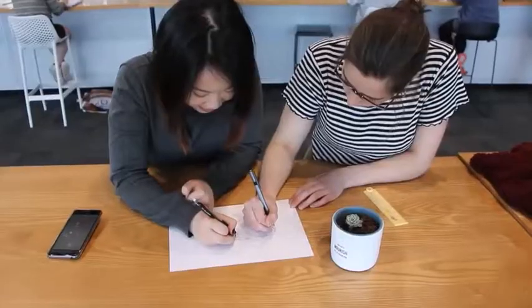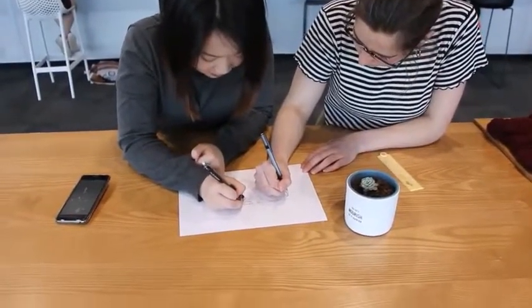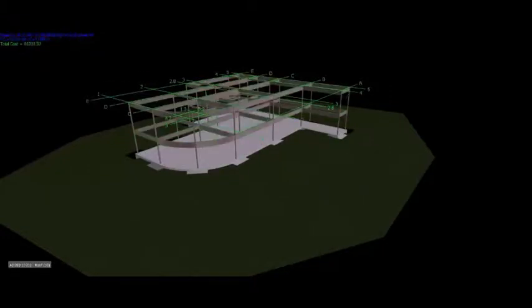BIM is a program that helped us visualize the building and how all the different components came together in a 3D model. We used the sets put together by the quantity surveyors to help develop the project schedule in the form of an AON network diagram. Using BIM meant we could easily make sure we included all of the sets when developing the schedule. The 4D simulation showed us what the structure looked like during each stage of construction. This made BIM a useful tool when it came to identifying any delays during the actual construction.